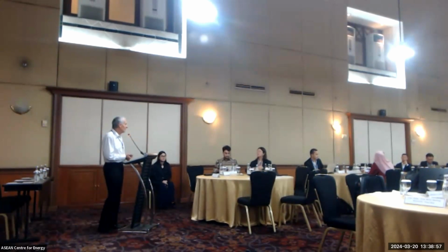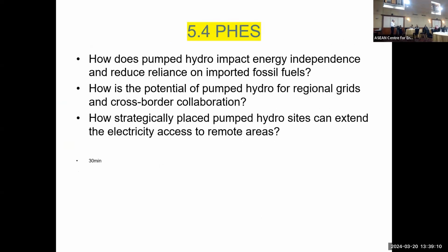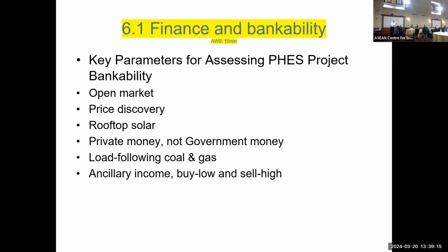It's obviously important before you build a pumped hydro that you have done some good energy modeling, high resolution hour by hour energy modeling, so that you know you actually need it, or that you can predict when you will need it. So the shortlisting of good sites and the high resolution modeling go together, and then comes the pre-feasibility analysis, and then the feasibility analysis, and so forth. But always you're refining your business models.